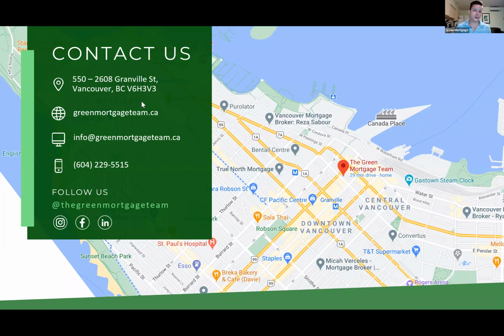You probably still would want to consider doing construction and breaking into draws, because what will happen is if you fund the full $500,000 in the land draw, now the interest on the full $500,000 will accrue. So you still may want to break it down into draws, because then you're only borrowing money as you require the funds, as opposed to borrowing all of it, paying interest on it, even on the money that you don't need right away. So that's one consideration. But yes, in theory, you could just borrow the whole amount and then use that to finish the construction, so you don't have to go back and forth for each draw.